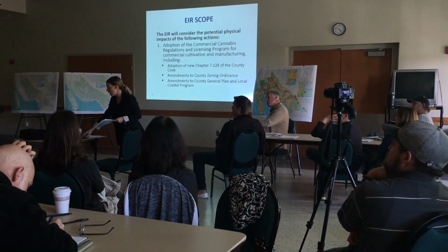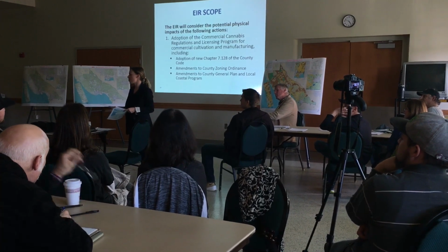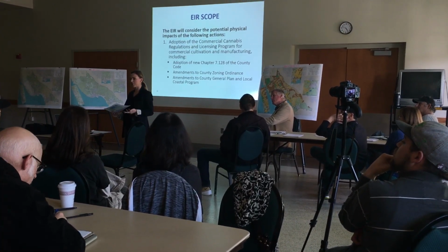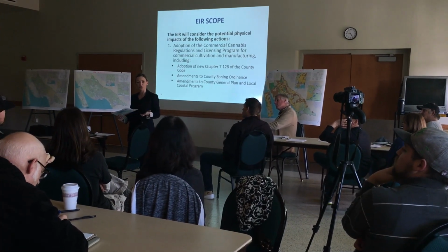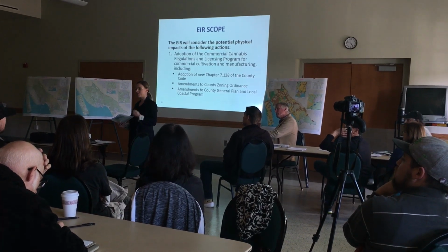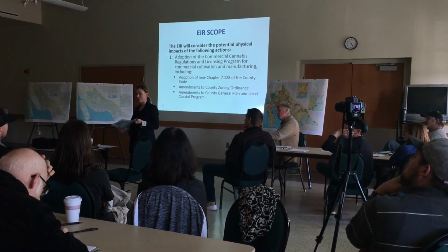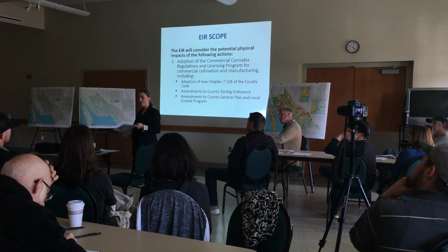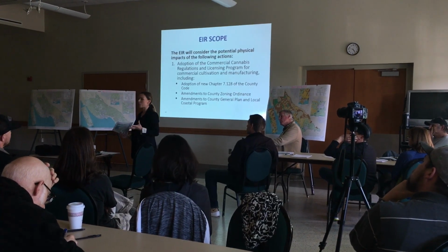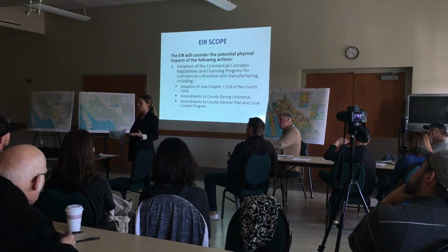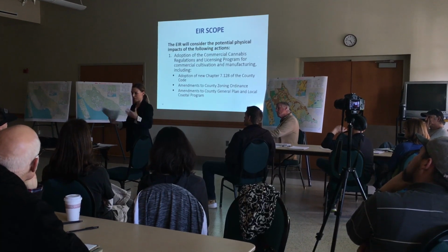Also, I should mention that in addition to the adoption of the ordinance, there are a couple of other actions that would have to occur in order for the project to move forward. There would have to be an amendment to the general plan and local coastal program, and also a change to the zoning ordinance itself to make cannabis cultivation an allowable use countywide.